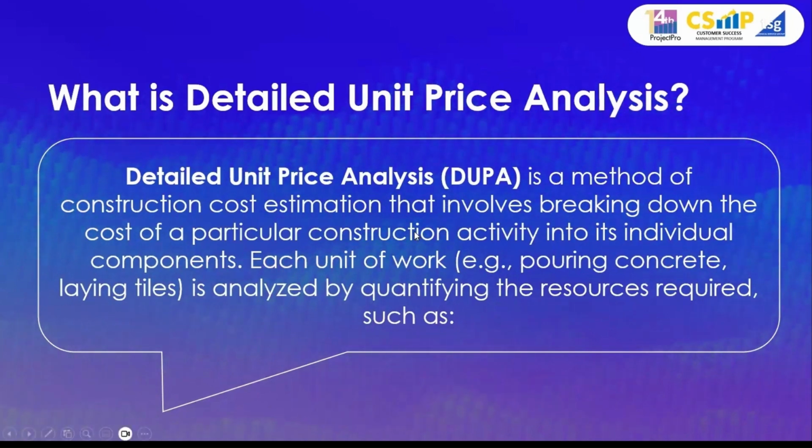So DUPA, or detailed unit price analysis, is simply a method of construction cost estimation. This is actually a generic one, but in most cases it is widely used and applied in our government institutions. This involves breaking down the cost data of a particular construction activity into individual components, or simply identifying each specific unit of work to each specific resource that we will then be costing.